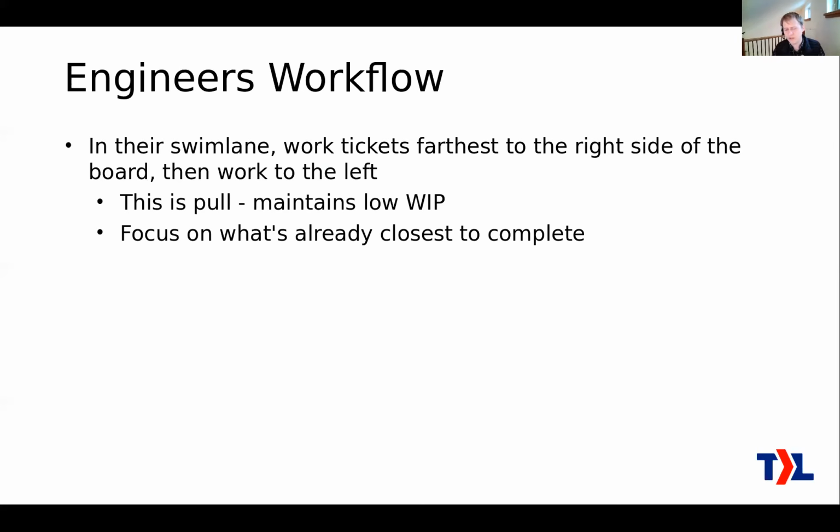And by focusing on the tickets that are on the right side of the board, that's the stuff that's already closest to being complete. And so that means that you deliver that value to the customer as soon as possible, because if something is 90% complete, you work on that before you work on something that's 50% complete. You may as well, and then the customer gets that value. So that's roughly how they work. And again, that's something that we speak to a bit more in the service webinars.